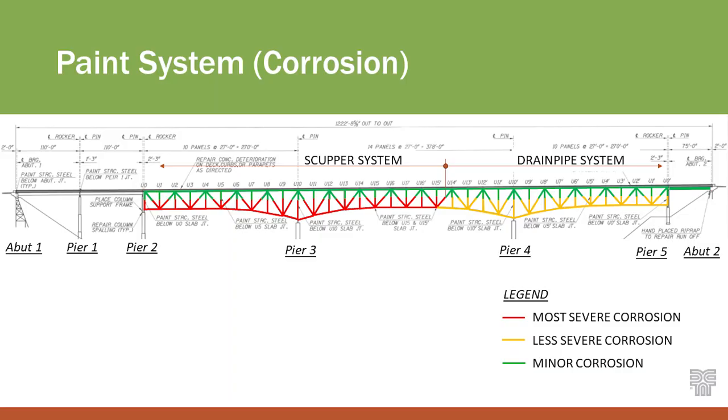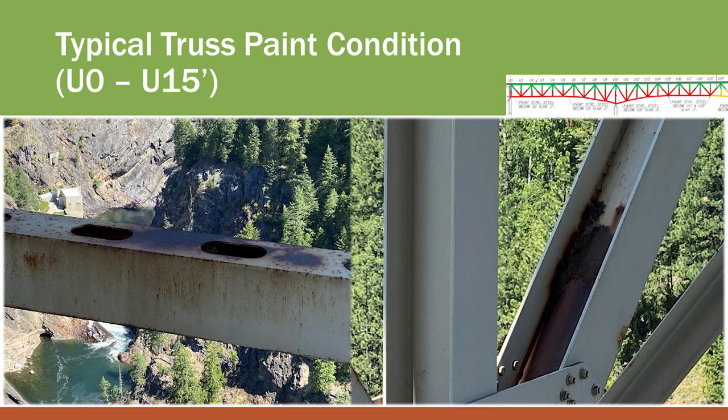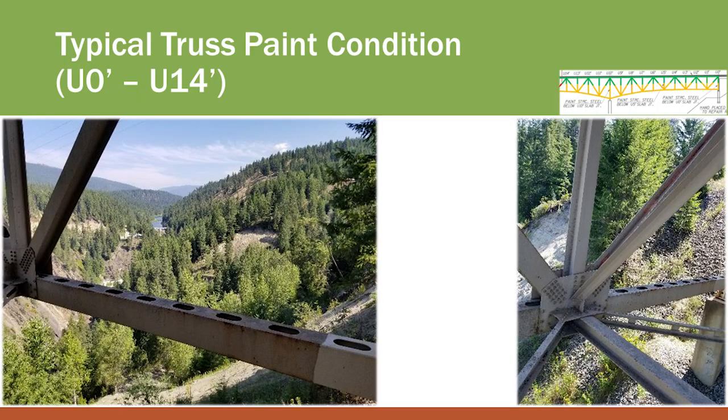The truss had two intermediate expansion joints due to its construction — it's like a cantilever truss with a drop-in span. Those joints in the deck leaked, which caused all kinds of grief on the painted steel. So ITD removed those joints, replaced it with continuous deck from end to end of the truss. And included with addressing those leaking joints, they did some significant zone painting.